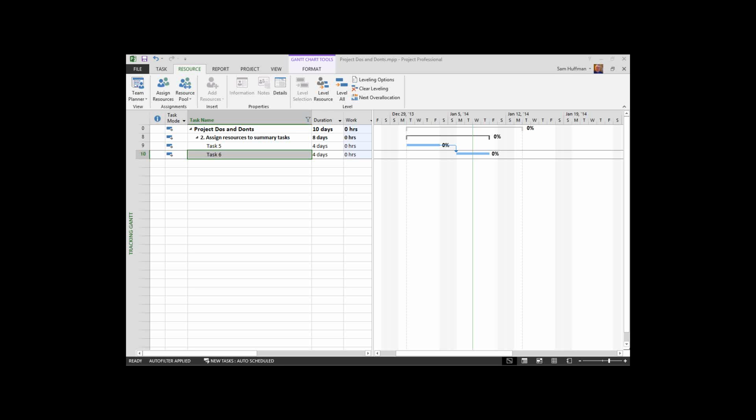Don says an E-day is 24 hours per day. Yes. Let me go over those durations again for you. An elapsed minute is 60 consecutive seconds. An elapsed hour is 60 consecutive minutes of 60 consecutive seconds. An elapsed day is, from the time that its task starts, whatever the time of day, 24 consecutive hours of 60 consecutive minutes of 60 consecutive seconds. And it goes on like that.